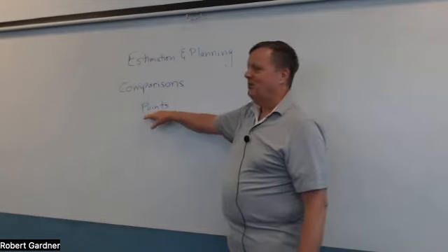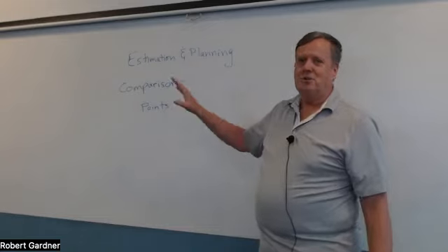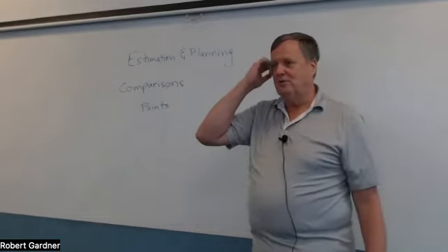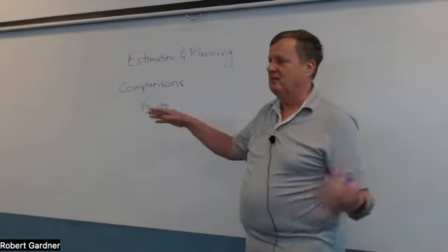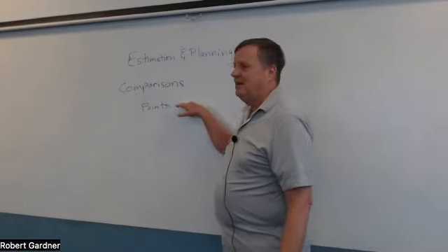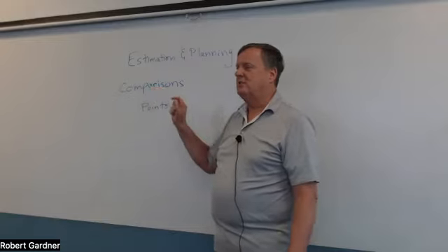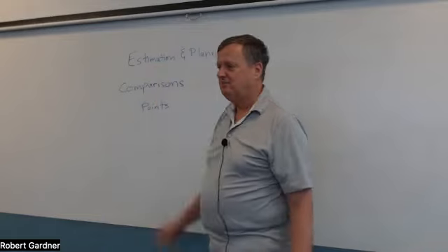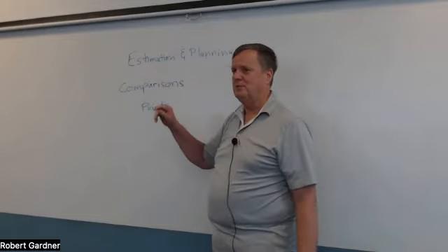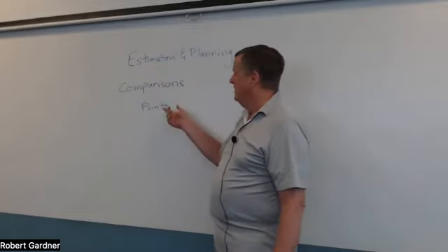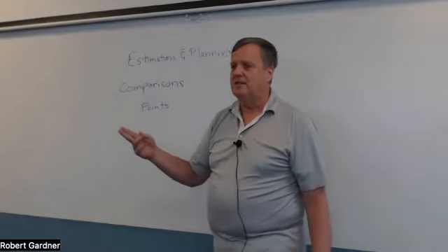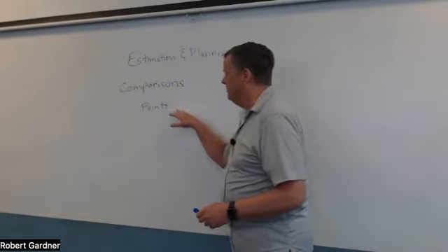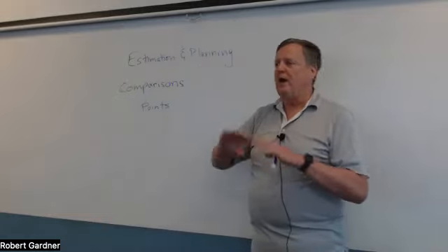A point is just an arbitrary number, usually a small integer, between 1 and 10 or something like that. It's just a number that you assign to a task, which indicates on some arbitrary scale how hard it is. Or not how hard it is, but how much time it took. So I have a 2-point task and I have 5-point tasks and so on. So the numbers are arbitrary, but they aren't random.